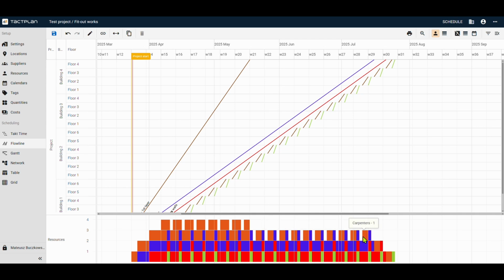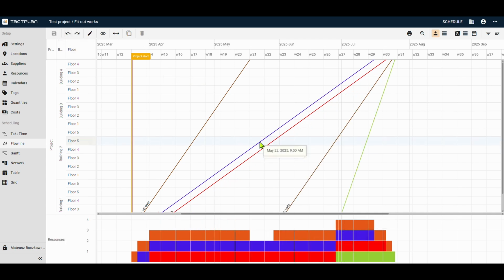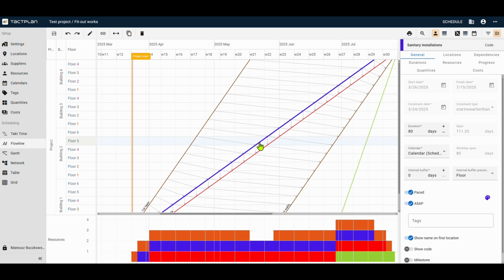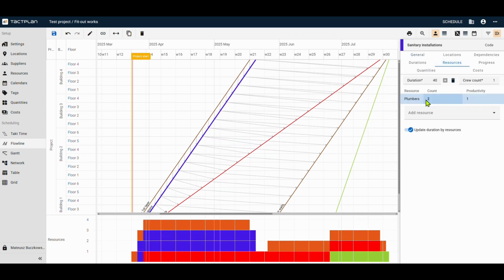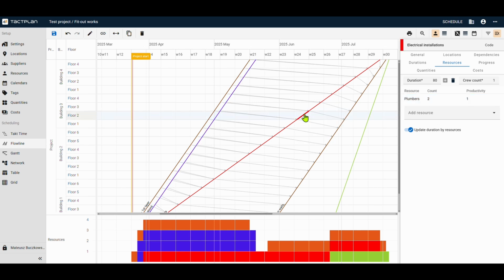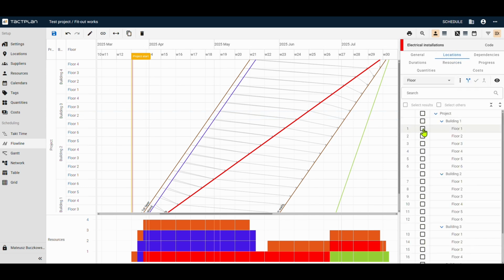Instead of simply snapping tasks to their predecessor, like in critical path method, let's plan smarter. Let's say I call the plumbers, and they agree to bring in a second crew. Now, their work aligns with the carpenters. Next, imagine the electricians can't add more people. In that case, splitting their task and inviting another subcontractor makes sense. Without it, the entire project would stall.